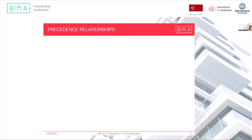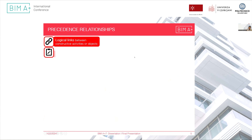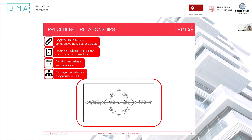In this dissertation, we are focusing on one part of the planning analysis: the precedence relationships. What are precedence relationships? They are logical links between constructive activities or objects. In the example provided on the screen, conditioning the second floor column to be built before its overlying beams is a good example of precedence relationships. They are important because they are responsible for finding a suitable order for either the construction or the demolition of buildings. They are crucial because they avoid time delays, reworks, and consequently cost overruns. In the past, they were displayed in network diagrams such as the critical path method, but nowadays they are directly assigned into Gantt charts.